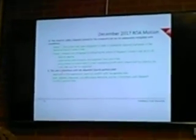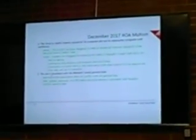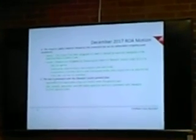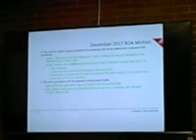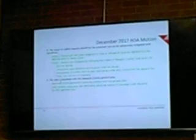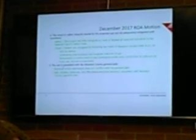Visual impacts are mitigated by following the intent of Wasatch County Code 16.21.19. We will be incorporating dark sky lighting. We will be using landscaping, deciduous trees, evergreen trees, and shrubs. We will be doing a 5-foot earthen berm to raise landscaping profiles when viewed from adjacent lots. And we will need front, side, and rear lot separation.